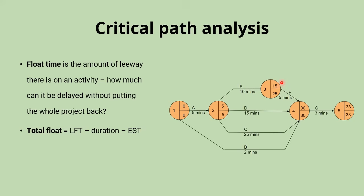Another way of looking at that: if we can start activity F after 15 minutes and it takes five minutes to complete, that brings us to 20 minutes — we still have 10 minutes before the 30-minute deadline to start activity G and remain on schedule. For activity B (making toast), LFT is 30 minutes, minus duration of two minutes, minus earliest start time of zero — giving a total float of 28 minutes.